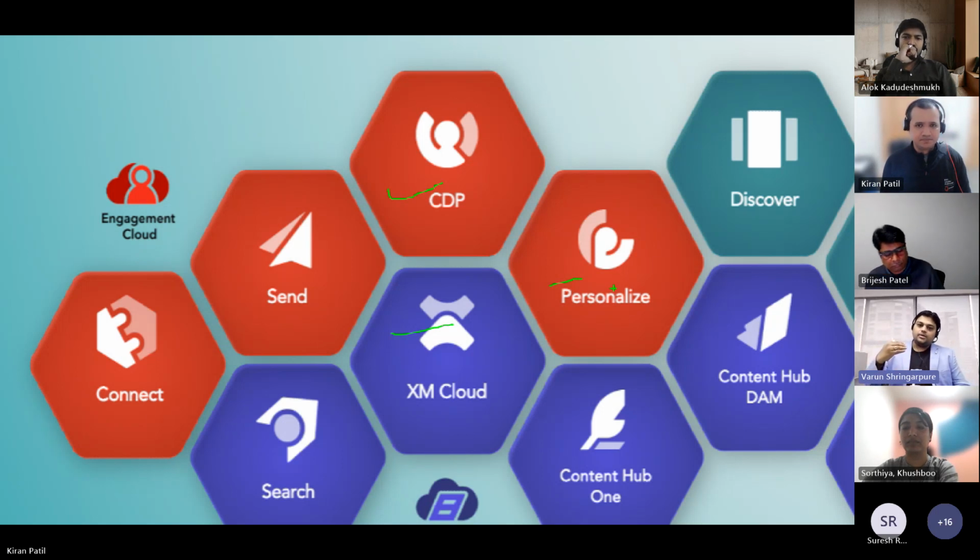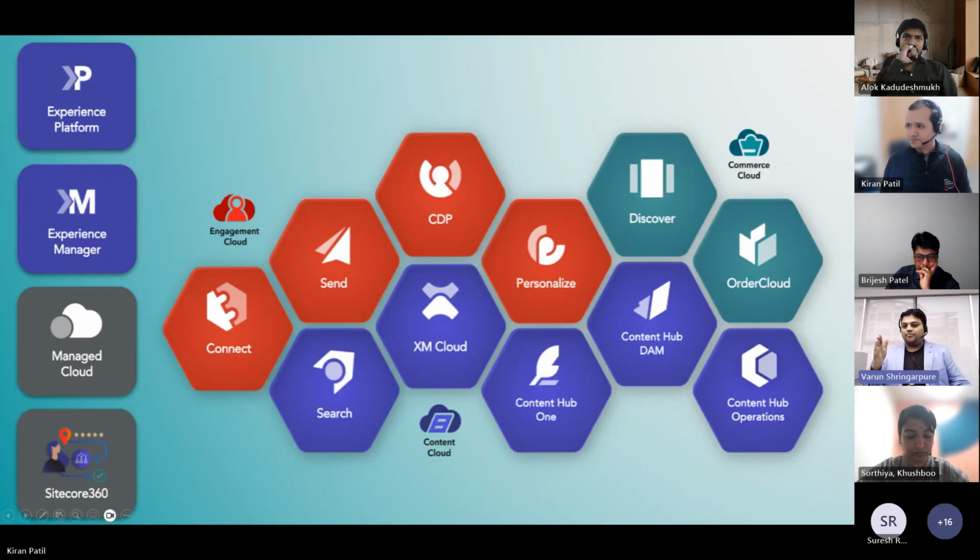But for an advanced level of personalization, the recommendation is to connect those two products, CDP and Personalize, at a later stage after you have an MVP release available, so that you have your basic website and usual personalization going out. Then you start collecting your guest data, build out customer profiles, do the audience sync, and then utilize Personalize to deliver a personalized experience on your websites.